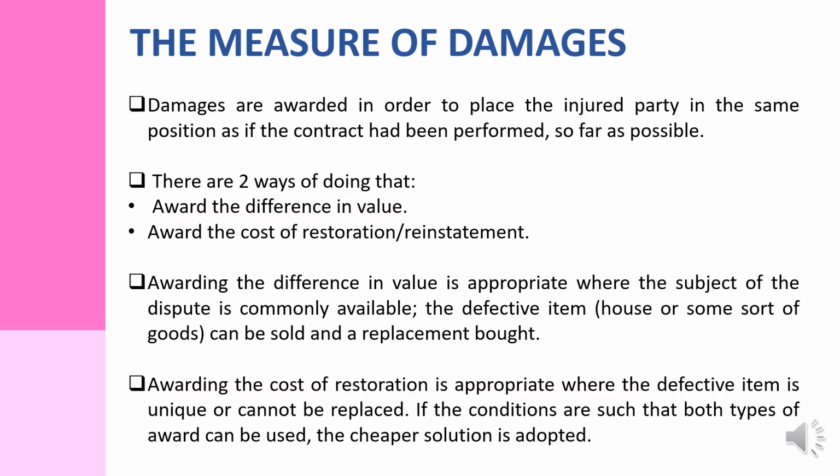The measure of damages. Damages are awarded in order to place the injured party in the same position as if the contract had been performed so far as possible. There are two ways of doing that: award the difference in value, or award the cost of restoration or reinstatement.